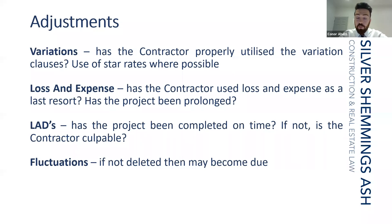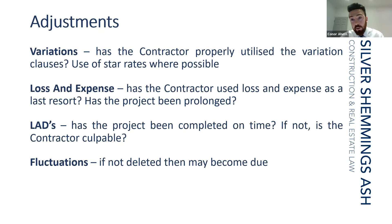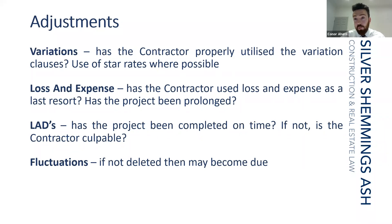Fluctuations: these are struck out in most contracts now, as most contracts are lump sum and don't cater for fluctuations, so the rates for the duration of the work are deemed to be fixed. Not to be confused with inflation — if inflation in respect of a substantially delayed project creates grounds for recovery, that can apply. But generally the fluctuation clauses deal with fluctuations that occur to your rates during the course of the work. Just be familiar with what the position is under the contract.